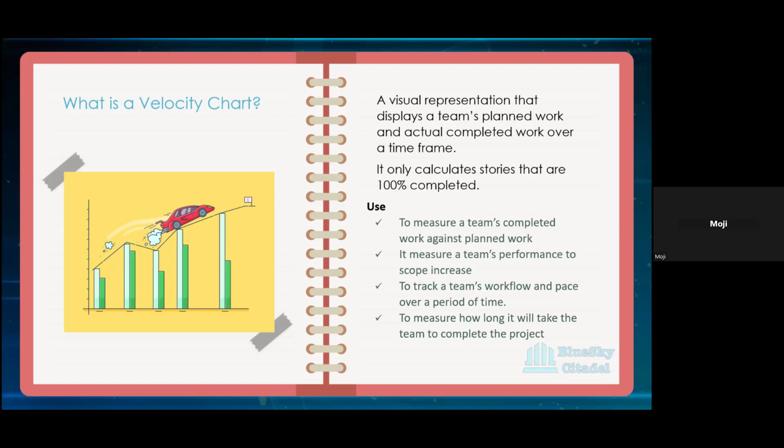So let's assume you've had 3 sprints. Okay, let's assume that you've done 3 sprints with full team capacity. Then it gives you an average of 50. You know that, okay, so that means that when our team members are full, we can definitely work on 50 story points. Or for user stories, it's showing you 15 at the end of the 3 sprints that you've had, when you know that all the members were full during the sprint.